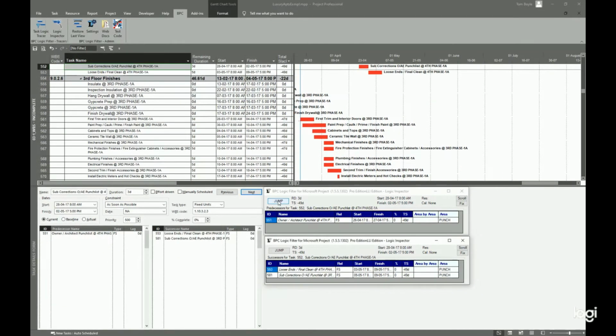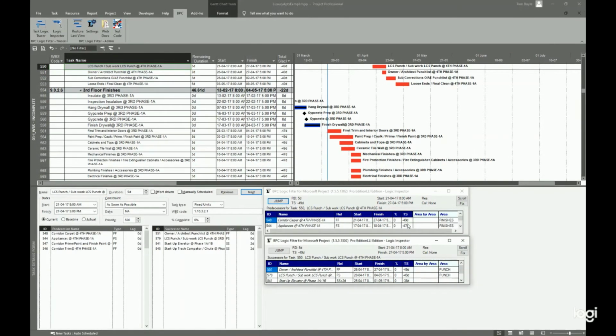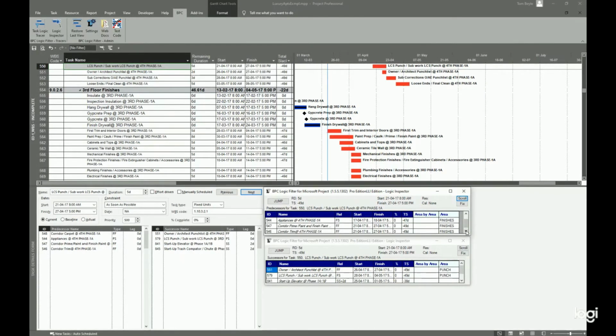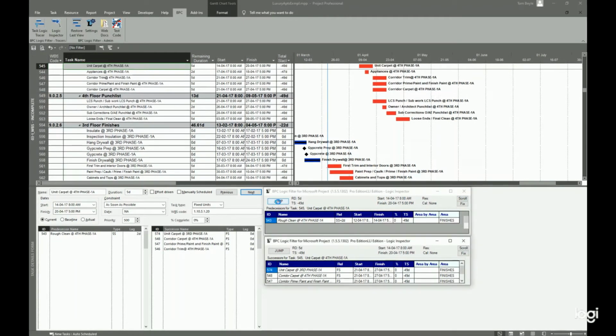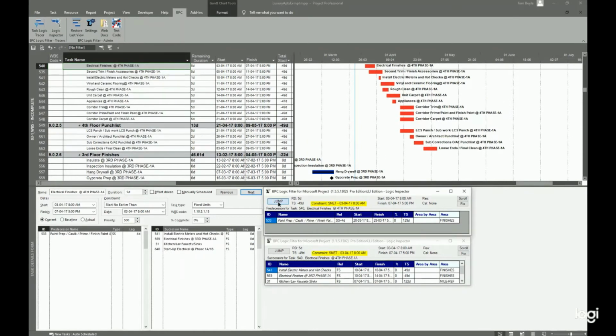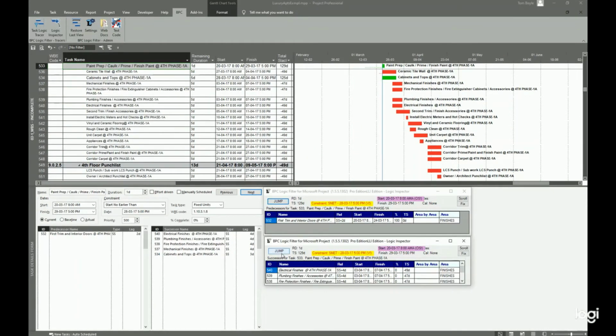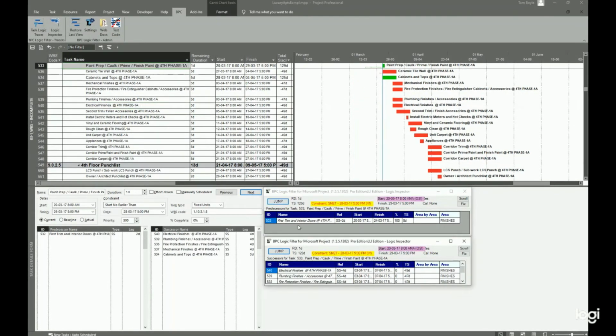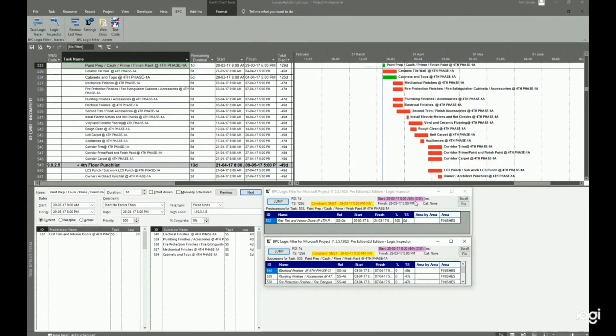There's a little scroll button here that allows us to expand or contract the window. And then we can select any predecessor or successor task in a window and then just jump right through the network and inspect. Now if we see a constraint highlighted, then in this case it means that the constraint was active and effective. When the constraint is highlighted red, that constraint has been violated here by an out-of-sequence actual date that was applied to the selected task.